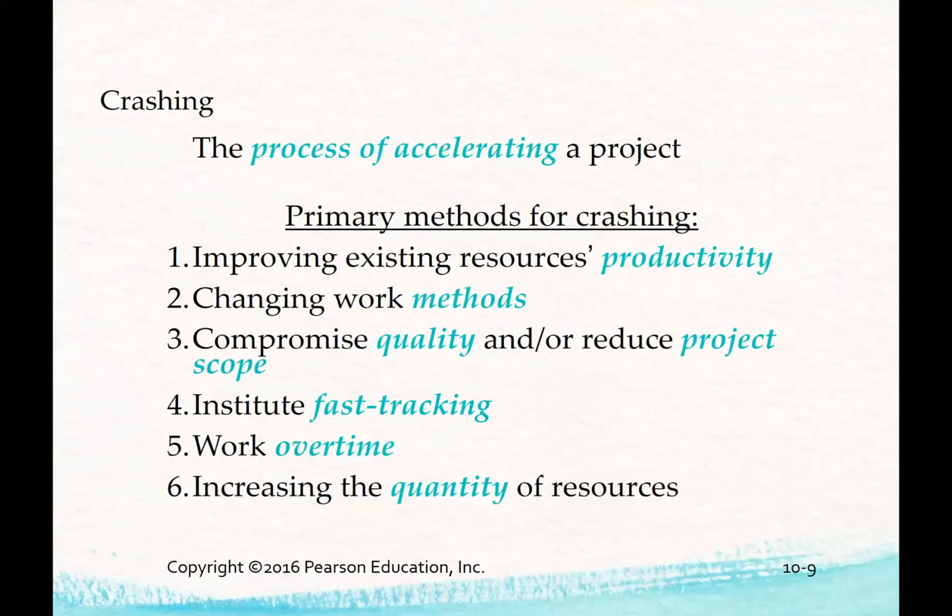So when we're looking at accelerating a project, we're looking at improving the productivity, changing our work methods. Sadly, sometimes we have to compromise quality or we reduce the scope, and that's a conversation that you have to have with your client in going, if you want us to reduce it by this much time, it's going to be a cost to it. We're going to have to change things. We're going to have to change our activities. So you can see that there are a number of ways that we can look at crashing.